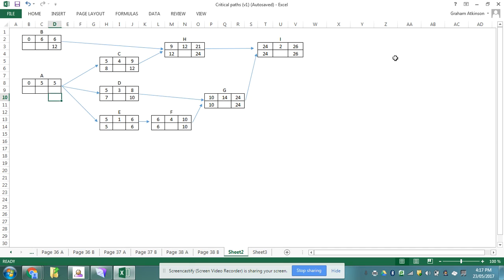Now when I come to this, remember as I'm working back, I've got to find the smallest value. So that has to start at 5 and finish at 0. And that's going to finish on 6. So I'm using that rule: as I'm going forward, I always take the largest number, and as I'm working back, if it's 2 numbers, I take the smaller one.